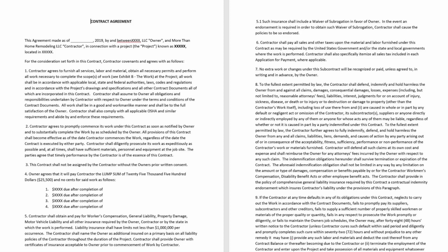The biggest components to any contract are time, when is it going to be done; scope of work, defining specifically what is going to be done. The more detailed you are, the better off you are. Next is payment. How and when are you paying them?